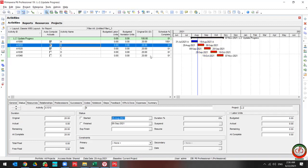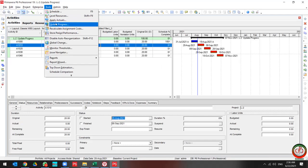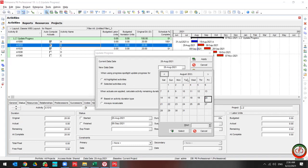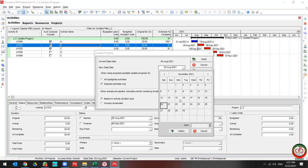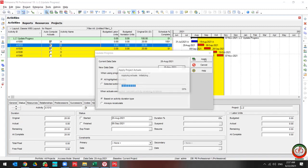Then go to the Tools, Select Update Progress, and change the data date again to November 10th. This time, I want to update all highlighted activities, then apply it.